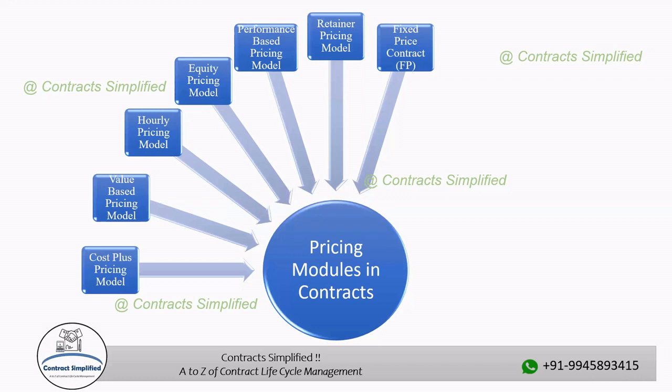However, unlike a simple fixed price contract where the price remains fixed regardless of performance, an FPI contract includes incentives designed to encourage the seller to meet certain performance targets. FPI contracts are used when the buyer wants to mitigate risk associated with project cost overruns while also providing incentives for the seller to manage their cost effectively. These contracts promote collaboration between the buyer and seller and encourage the seller to find cost-saving solutions and improve project efficiency. Example: the seller must complete the project for $100 in line with the clearly described requirements.